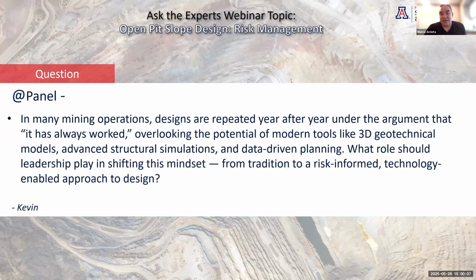trying to be proactive, meaning, Kevin, if you are in the reactive mode, where you're executing, and your instrumentation is telling you what is going to happen in 2-3 days, that mindset is not going to shift. But if you commence to work in a proactive approach, where you have 2, 3, 4, 5, even 10, 20 years in advance a risk assessment for your pit geometry, then you can communicate that.